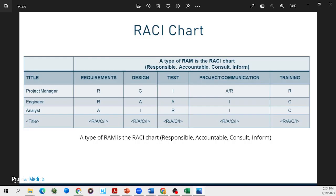Here's an example of a RACI chart. You can see we have the project manager, a role, engineer, and an analyst — all roles on the vertical axis of this table. On the horizontal or x-axis we have the requirements, design, test, project communication, and training. It becomes very clear from this who is responsible.